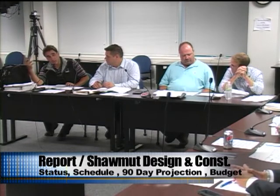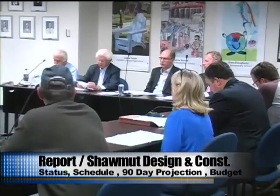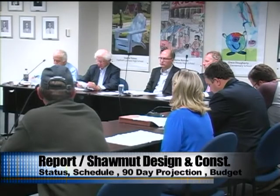And then some of the fittings were actually dry, and ProPress fittings that sit for so long and are dry may have to be replaced. But we just simply won't know the extent of it until we get all pressure on the system and test it for 24 hours.